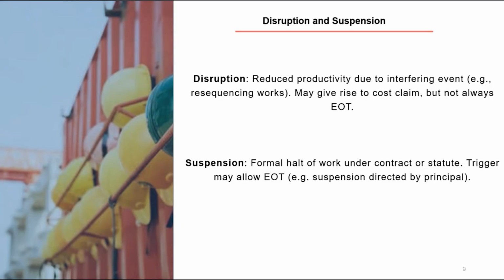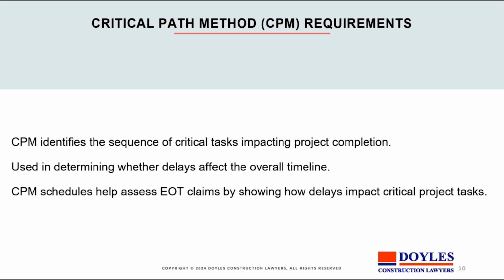Of course, if suspension is caused by the fault of the contractor, then those entitlements would usually be lost. The other aspect, coming back to the CPM requirements, is that it's identifying critical paths as opposed to items of work that have float or are able to be done with some lag or catch up.